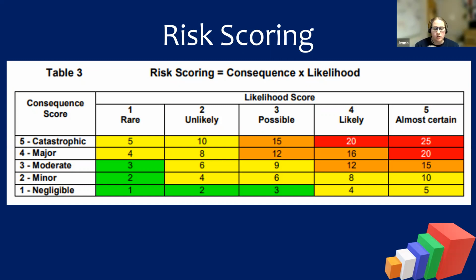So if we're dealing with the risk, it should be without anything in place, nothing to fix it. It is the worst that it could possibly be. And we need to consider, obviously, with this risk, how many of the domains are relevant to this risk, and what is the potential consequence of that risk.